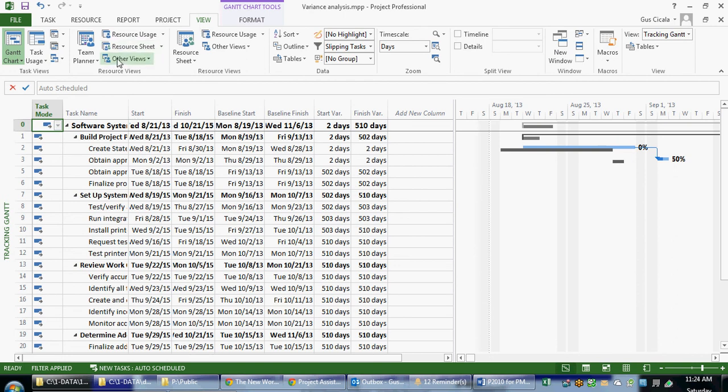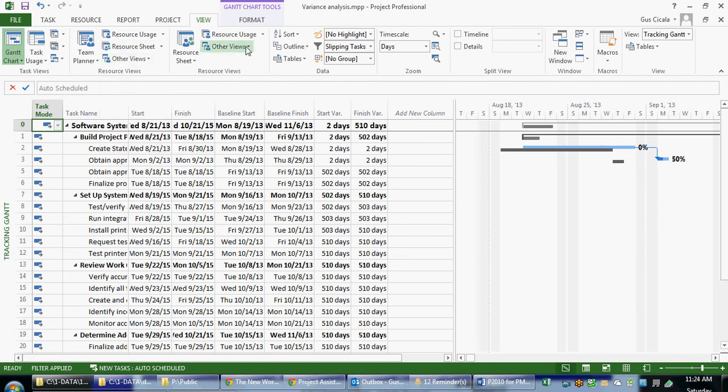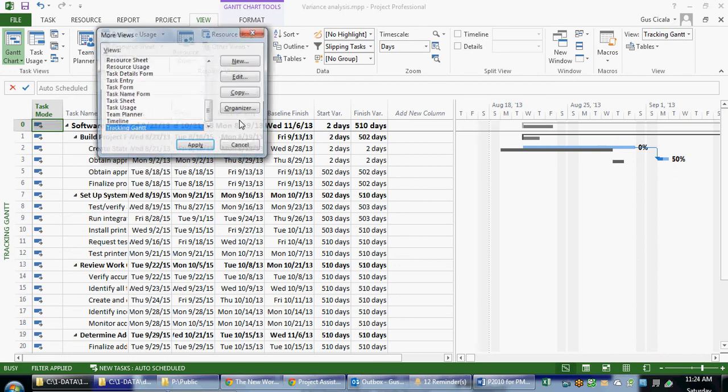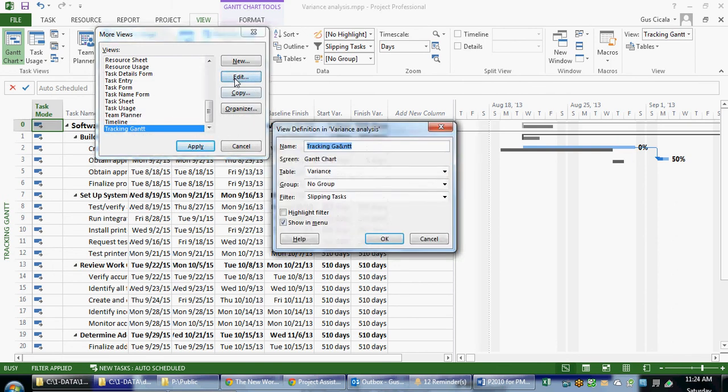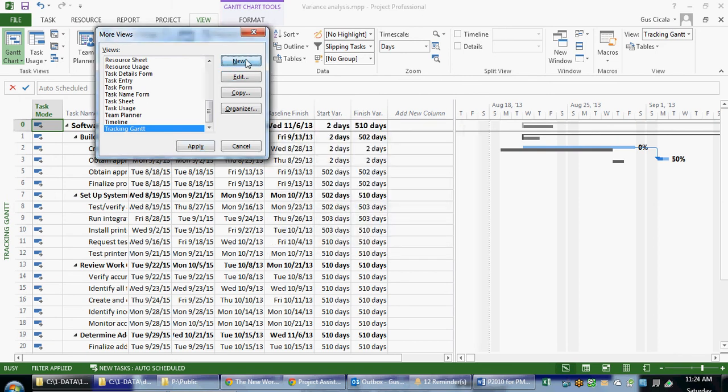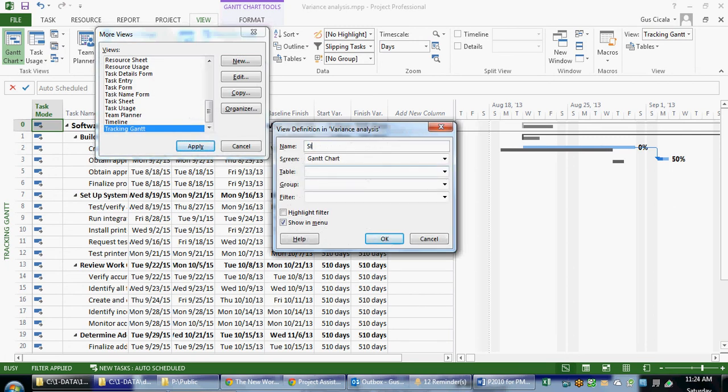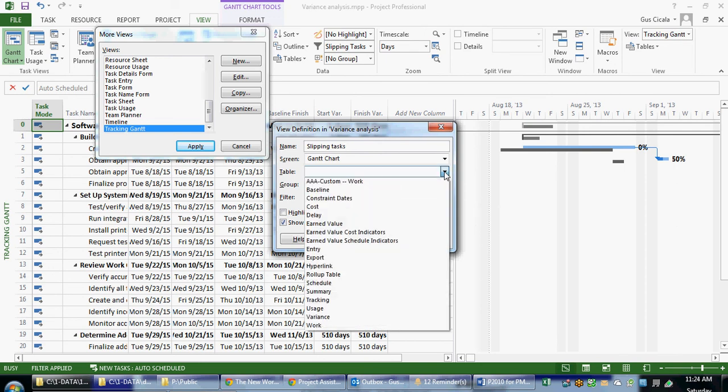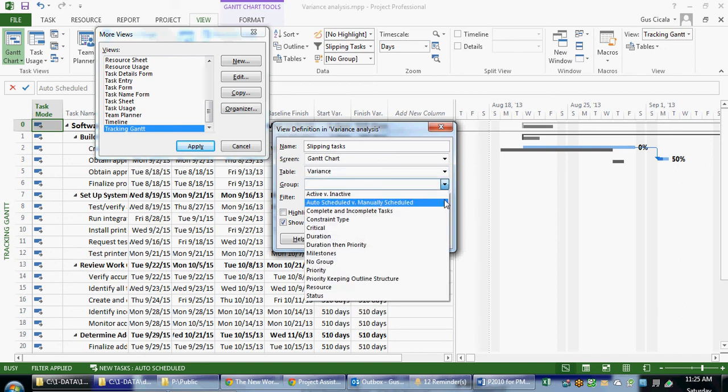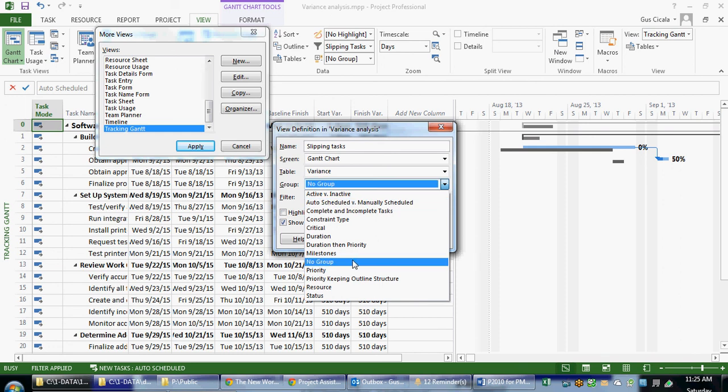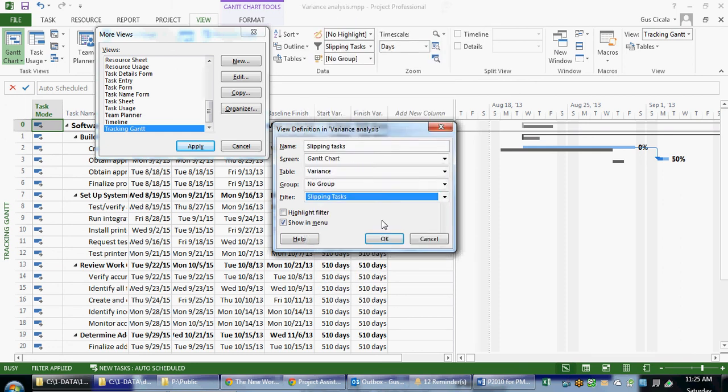I also mentioned views. So if we choose other views and more views, we can actually create views. For example, I can call something... I'm not going to edit this view. I'm going to create a new view. If I choose Slipping Tasks, I can choose the table called Variance. That gives me a group of columns related to the variance data. I'm going to leave the group empty for the moment, so I'm going to choose No Group. And for Filter, I'm going to choose Slipping Tasks. I can show it in the menu.